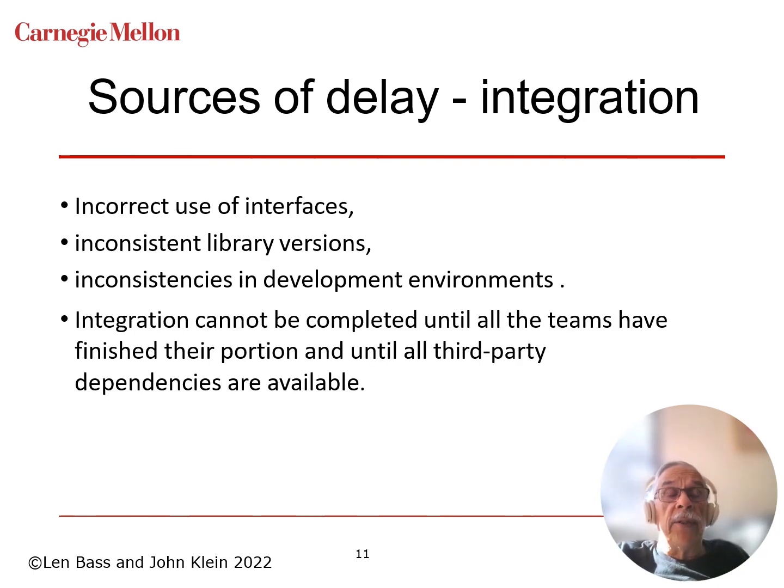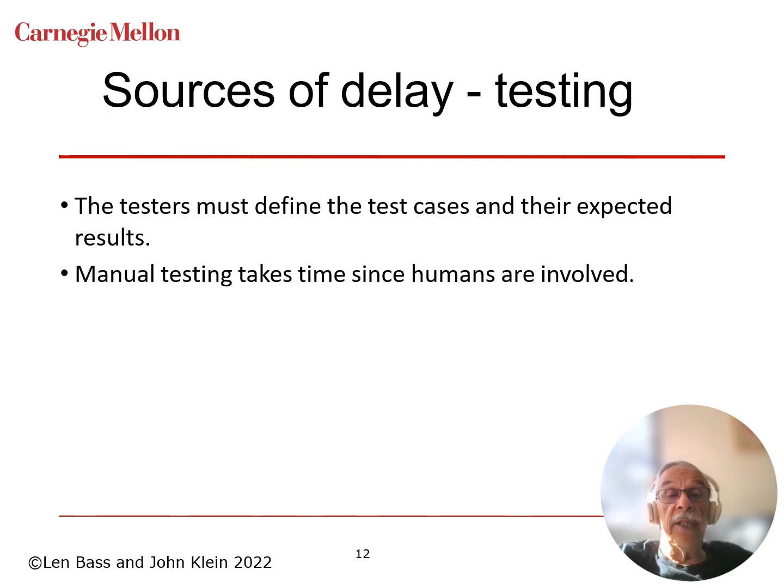There are delays in integration, incorrect use of interfaces, inconsistent library versions. I mentioned that. Inconsistencies in the development environments. So you're not necessarily sure that all the different teams are using the same environments. Integration can't be completed till all the teams have finished their portion and until all the third-party dependencies are available. So there are delays there.